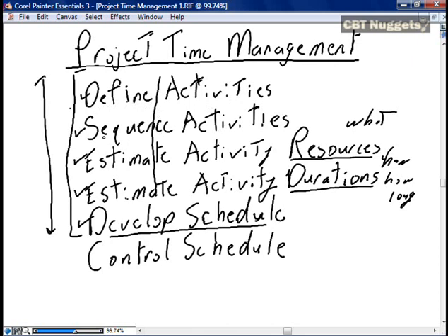You will probably have already determined the predecessor and successor activities, and you will probably be concurrently developing the resource and duration requirements. So really, again, often during project development, you're doing all of these components for time management concurrent with scope development and the development of the WBS. And really, again, what you're building towards is the development of the information required to build the project schedule in our scheduling software.